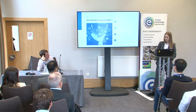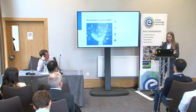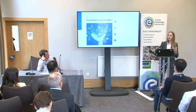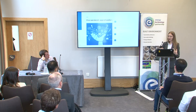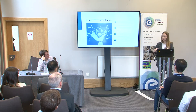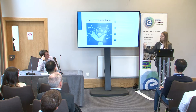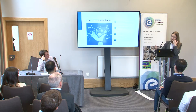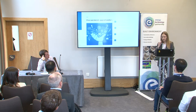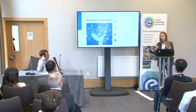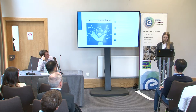That is an overlapping opportunity for digital twins to act as the golden thread, integrating good design, net zero considerations, and collaboration and transparency in procurement to produce and deliver on net zero targets. Collaborative procurement is superior to traditional procurement in this sense. I'm focusing my case studies on specific collaborative procurement systems and contracting that ensure digital twinning principles are integrated from the earlier stages — meaning a contracting team is appointed earlier on, all working together with off-site manufacturing and DFMA to deliver on those principles.